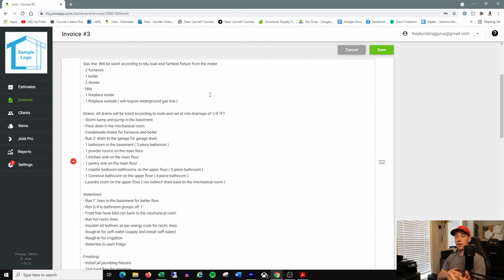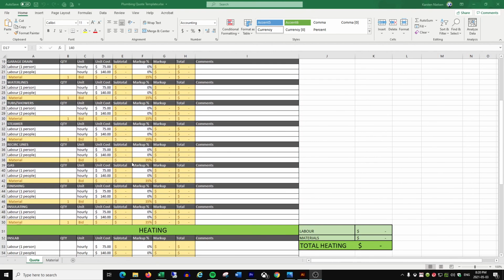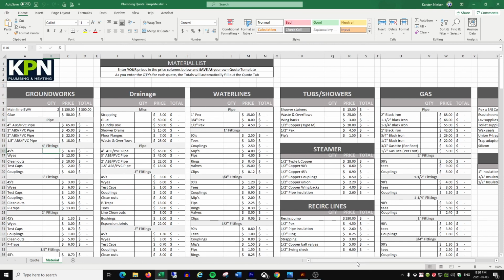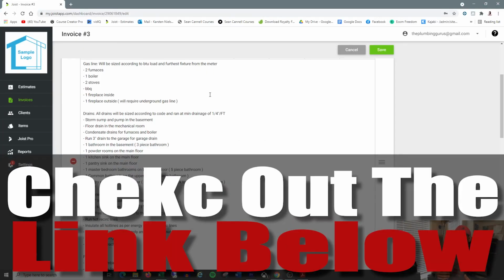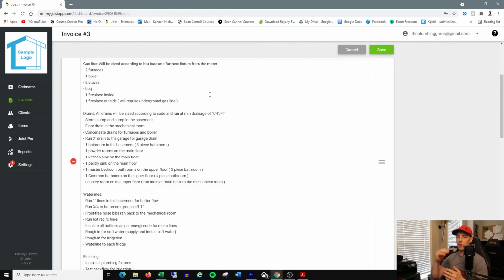I'm actually going to be making another video. I have a spreadsheet that I want to show you on how I structure all my quotes before I start filling it out and how I price things. That'll be a future video for you, and then you can refer back to that. I break it down into all the different sections like groundworks, drainage, water lines, tubs, and then I can invoice accordingly. I'm not going to get into it too deeply, but I will be doing that video.